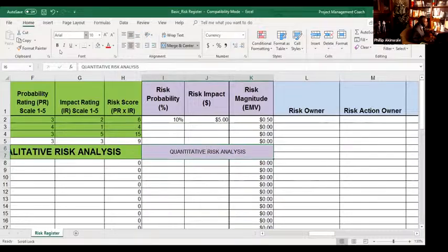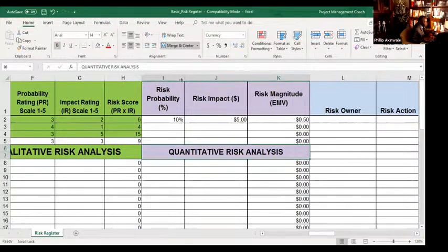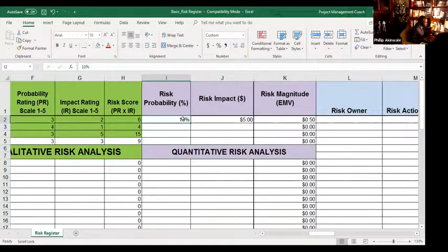Now, to bring it into layman's theory and make it less ambiguous with the Monte Carlo, what you are doing in essence is you are taking the probability of occurrence on a scale of 0, if there's no probability, to 100, 100% of course being the biggest. You're taking that consciousness and awareness of probability and you are analyzing with experts. What is the probability of that risk that Phil talked about? What is the probability of it happening? Someone said, oh, it's a 10% chance of happening. How do you know that? Based on my expertise. So in your Monte Carlo, you're still putting in your human understanding. That's why if you put garbage into a Monte Carlo, you're going to get garbage out. So you better be putting in good data. So let's say we put in a risk probability of 10%, and let's say the impact.